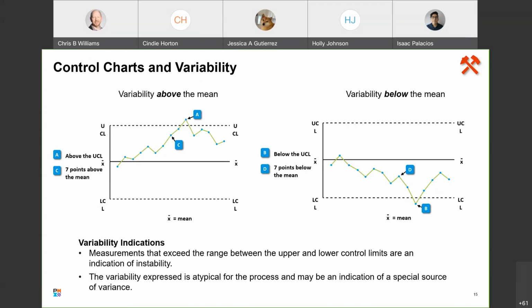It's important to remember that while control charts can effectively show variability, they don't indicate the source of the variability or show performance in relation to an expected performance. The control chart shows only the capability of the process to produce similar products. It does not show the conformity of that process to a customer's specifications, okay? So the whole intent of having a control chart and variability is simply to identify if your process is out of control, and then from here, we've got to start asking questions to find out why we have this variation, right? We've got to start doing some inspection or investigation.